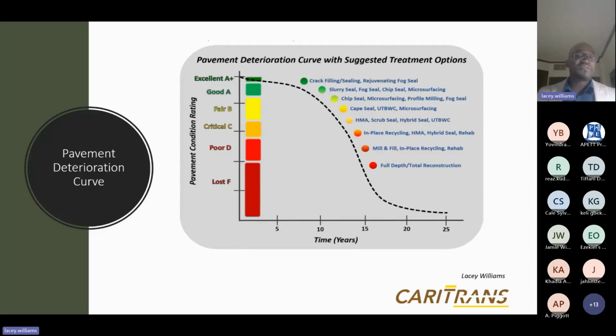So then, yes, a budget is approved, and then we go to tender for a consultant to do the design for the repairs. Then the consultant does his or her work over maybe a 6-month period, then develops a bill of quantities, scope of works, designs, drawings, everything. Then that goes out to tender, and the tenders are evaluated and so on.